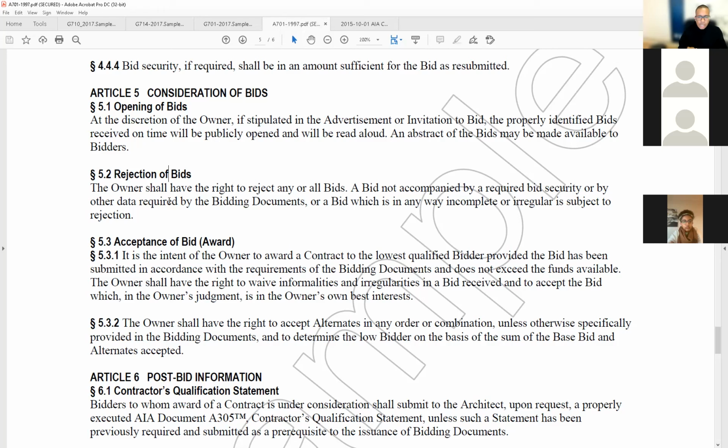They would actually say, Danco Construction, $500,000. Miranda Construction, $650,000. You know, all of the ones that qualify, right? That meet the criteria will be read out loud in a public place, a place that has been advertised. Can't just be in a little underground place where nobody knows about it. No, it's got to be public. It's got to be democratic, right?